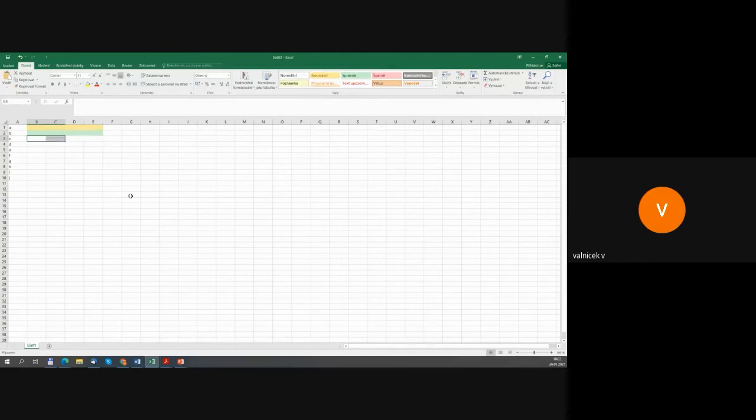We have half the length of activity C. I decided to use three colors because there's no way to make connections between these activities. The activity D starts at the end of the activity A and takes 15 minutes. So I will use the same color for the activity D to show the connection.